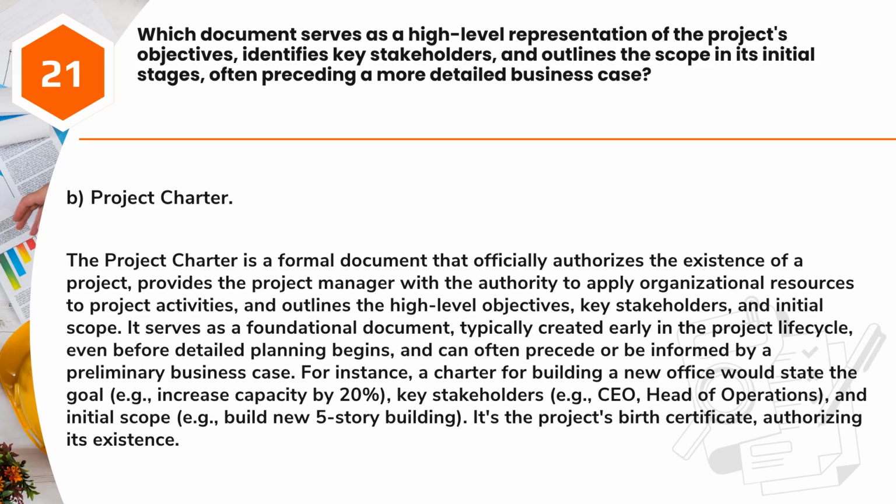Answer: B. Project Charter. The project charter is a formal document that officially authorizes the existence of a project, provides the project manager with the authority to apply organizational resources to project activities, and outlines the high-level objectives, key stakeholders, and initial scope. It serves as a foundational document, typically created early in the project lifecycle, even before detailed planning begins, and can often precede or be informed by a preliminary business case.